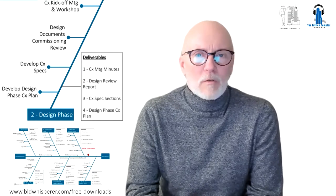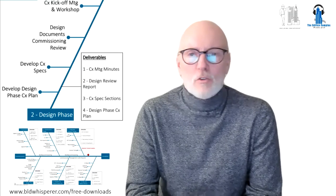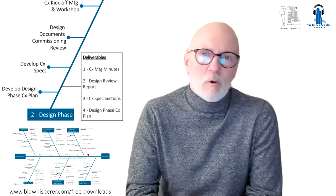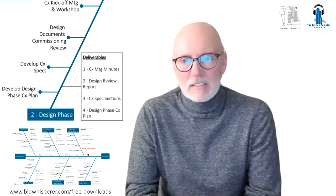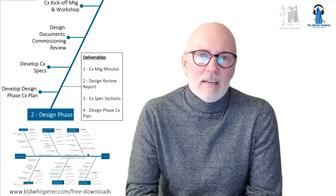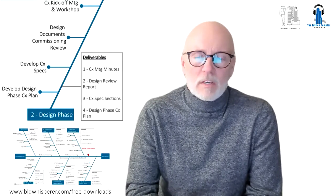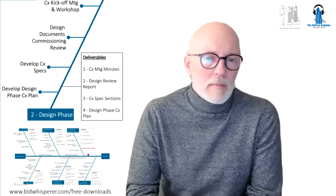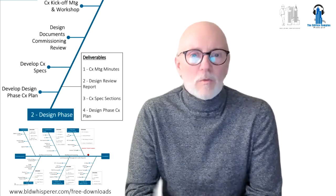It's about getting people in a room. It's an educational opportunity. It's a training opportunity. And it's a way of removing the excuse that I didn't know what was going on, I wasn't at that meeting. Make sure everybody is at that meeting when you have that kickoff meeting. And it's a formal start to something. It signifies a beginning. It's a very important meeting. It should be minuted and maybe even videoed if possible.